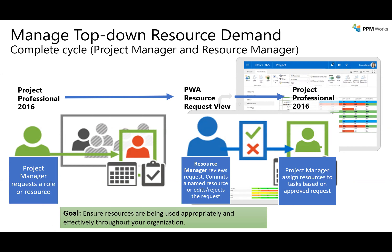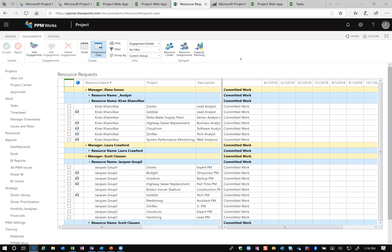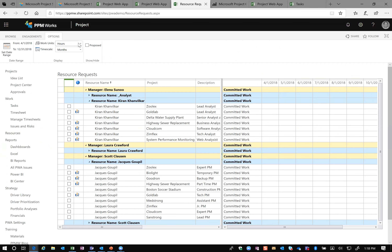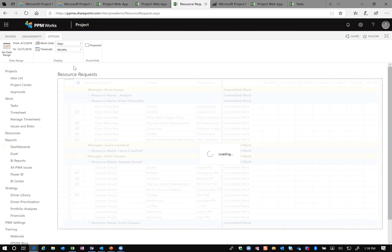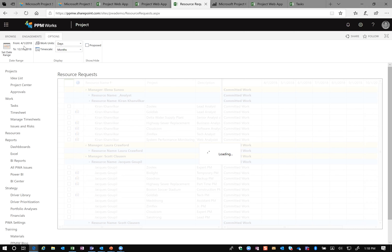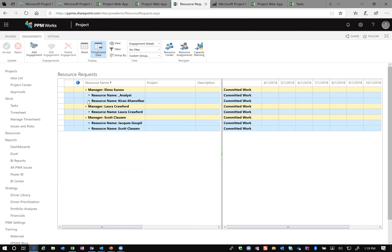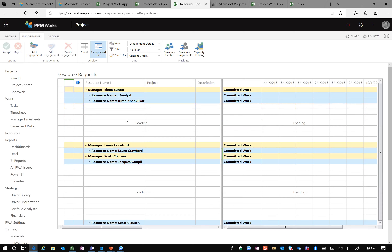Let me hop into our demo environment to show resource engagements. Resource engagements is an area within Project Online where you can request resources at a percentage level — for example 25%. You can view in months, days, hours, or weeks, and request proposed versus committed resources. You can also change the duration and time set, which places those time blocks from left to right within the tool.